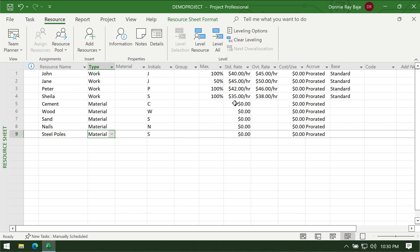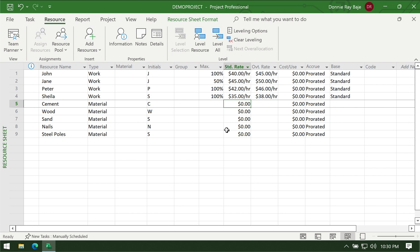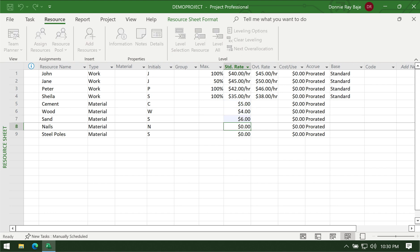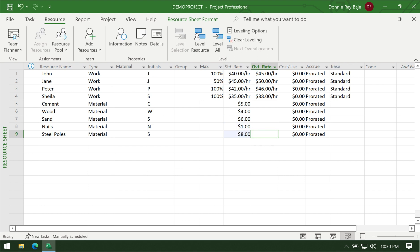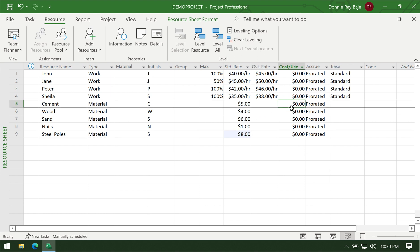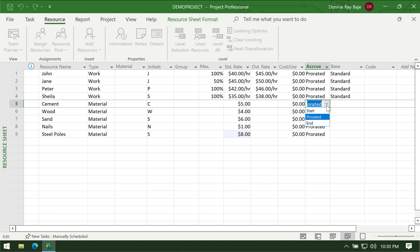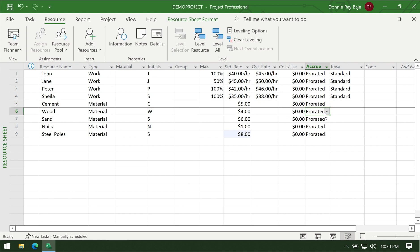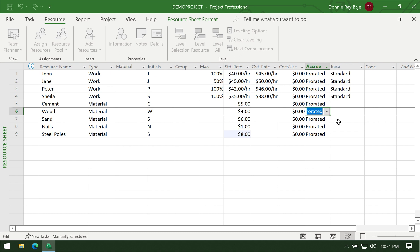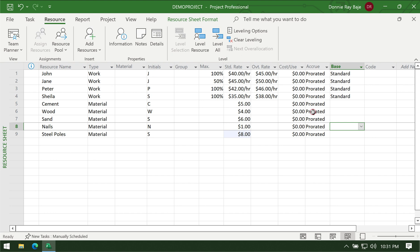We have the standard rate — how much does each unit cost. I'll assume some amounts: cement is $5, wood is $4, sand is $6, nails is $1, and steel poles a little bit more expensive. Next is cost per use — similar to the concept of work resources, do we need to pay something in order to use these items? Probably not. And then the accrual column — are we going to consider the material as consumed or paid once we start using it, only when done with the task, or prorated?